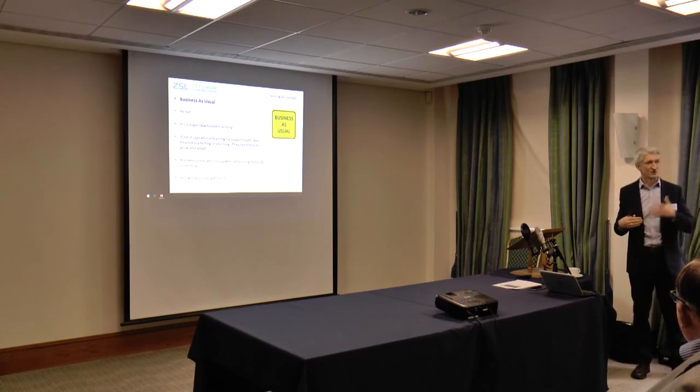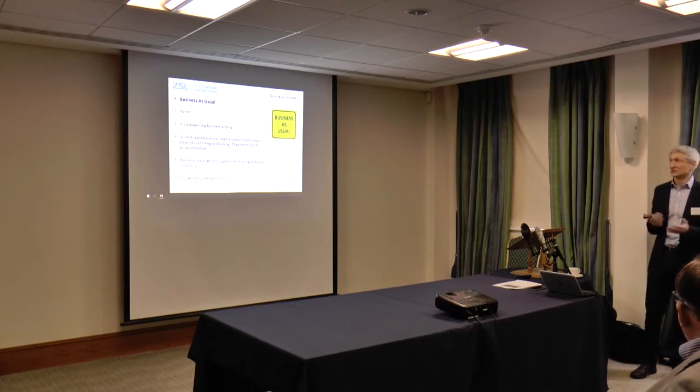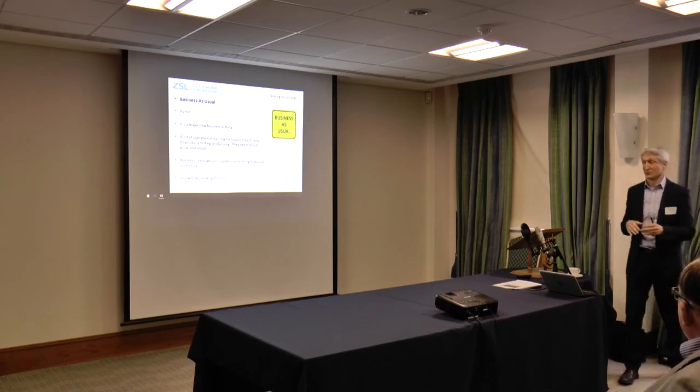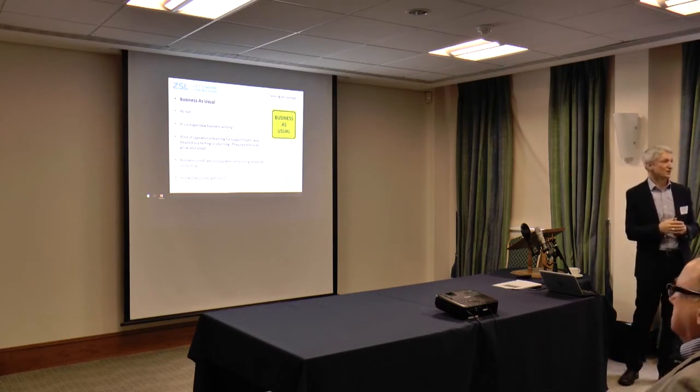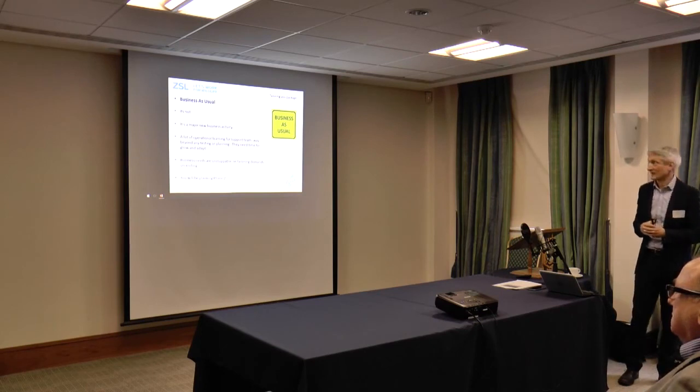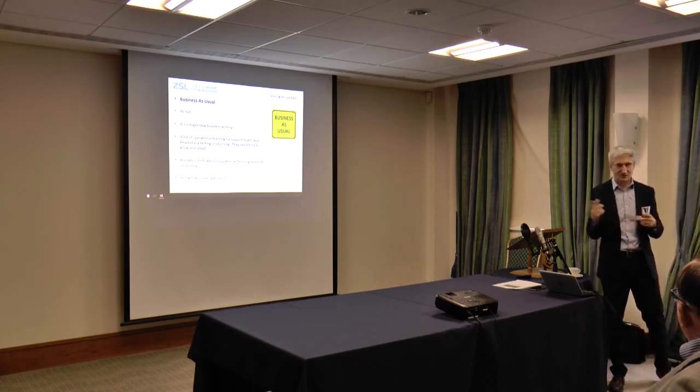And again, you get a number of those, and we certainly found that the resources that we put in place that we thought we were going to be using to be planned in phase 2 were suddenly all coping with day-to-day stuff. And that certainly was, again, perhaps we should have known better, but I'll come on to it in a minute. It was something that did knock us for a week or two while we got our act together.